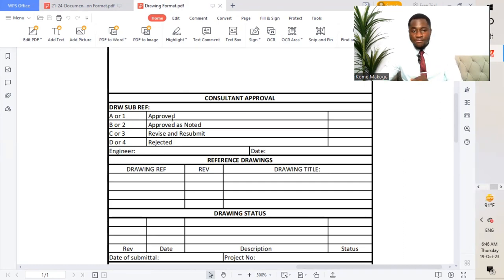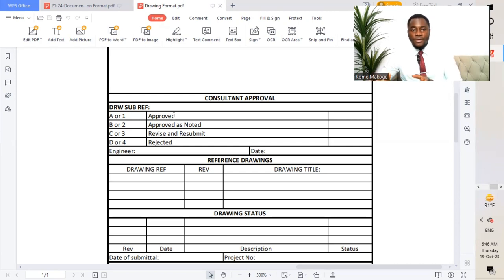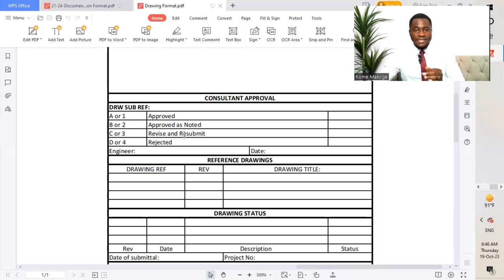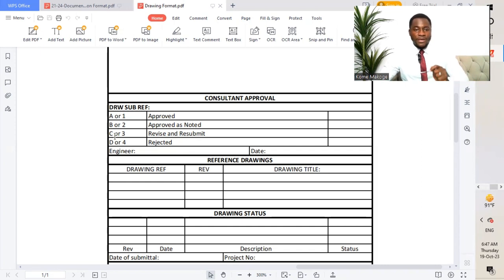Code A or code one means approved — no comments. Code B or code two means approved as noted — we have comments that need to be rectified and resubmitted to get code A. Code C means revise and resubmit — we cannot proceed with the inspection. For code A, we can proceed with installation on site. For code B, we can proceed with installation but must resubmit to get code A. For code C, we must revise the drawings and resubmit to achieve either code A or code B.